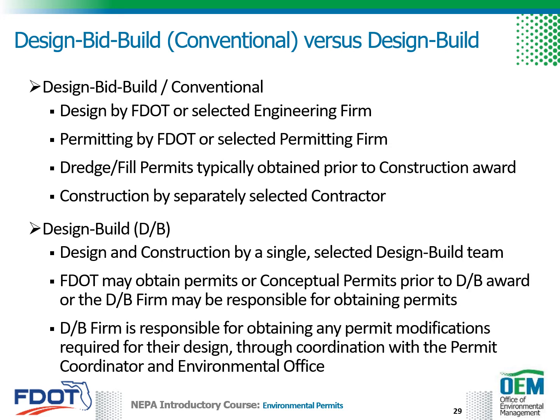Additional impacts to wetlands raise concerns, including whether additional mitigation is available or whether the U.S. Army Corps of Engineers or Corps, the Florida Department of Environmental Protection or FDEP, or the Water Management District would authorize additional impacts, given that the previous design demonstrated avoidance and minimization of these impacts.